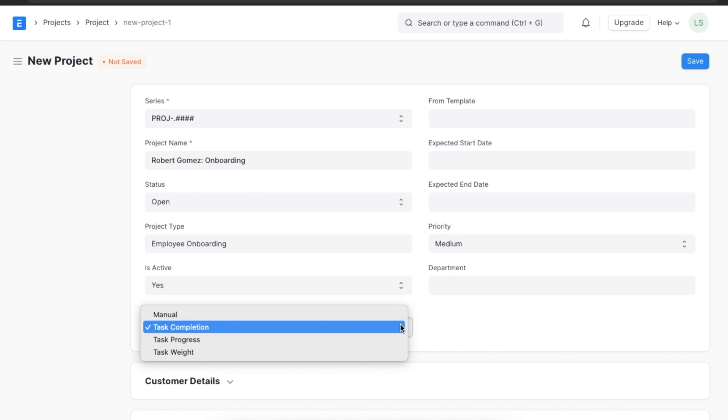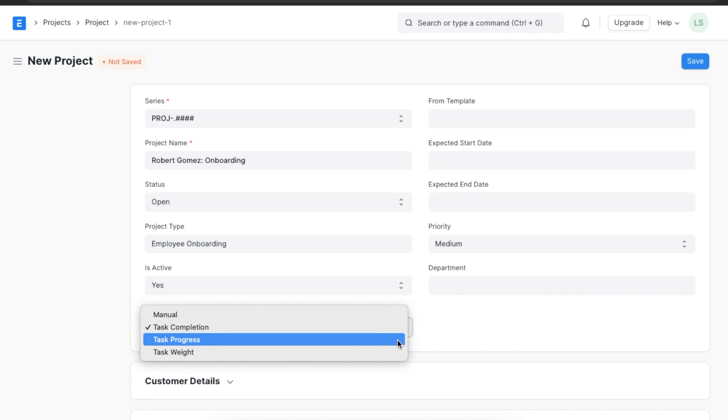Now we need to define how the project percentage completion is to be calculated. We can set completion method to Manual if we want to keep updating it manually. Suppose we want to calculate it based on the completion of each task, in that case we can select Task Completion. If we add 10 tasks and two tasks are marked as completed, then the project completion percentage is set to 20 percent. If we want to add the percentage of completion of each task manually and we would like the overall percentage of completion to be calculated based on that, we can set completion method to Task Progress.